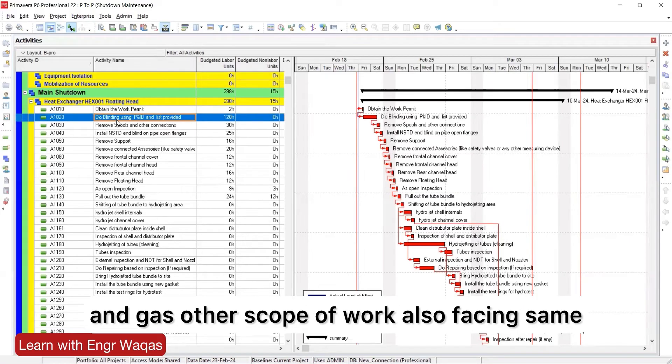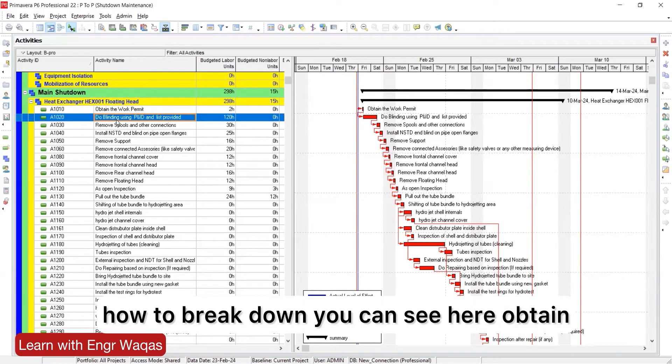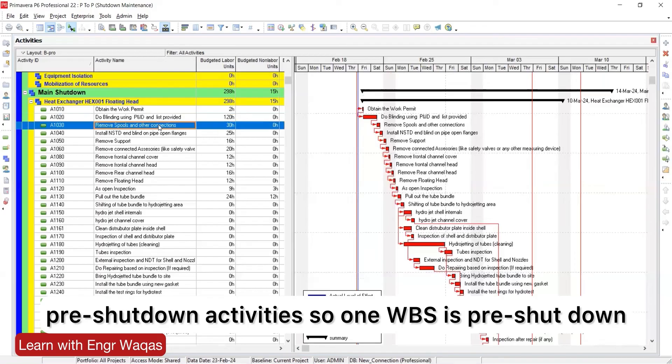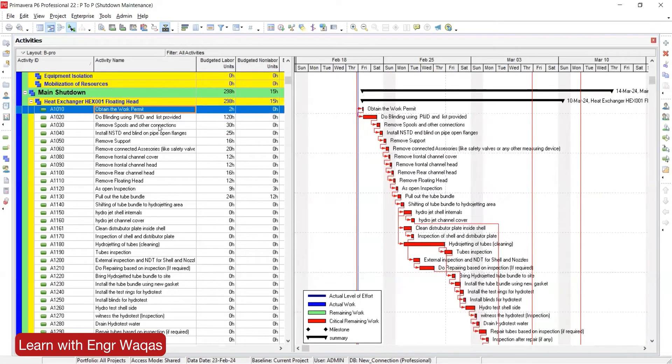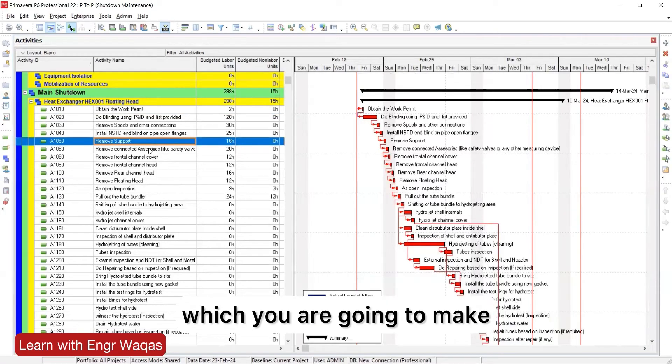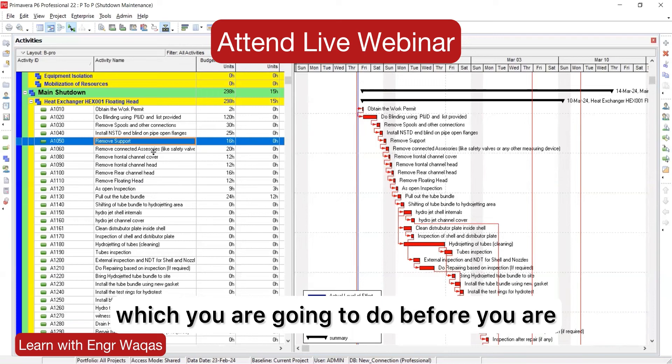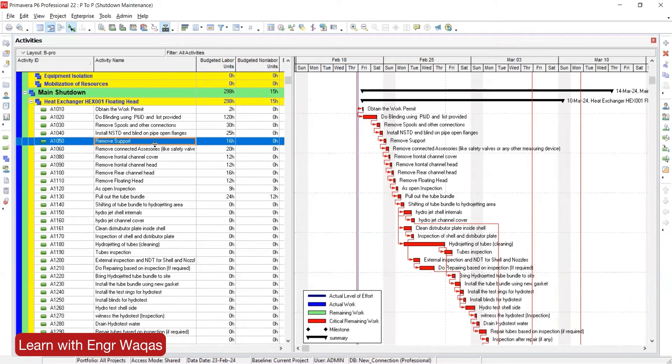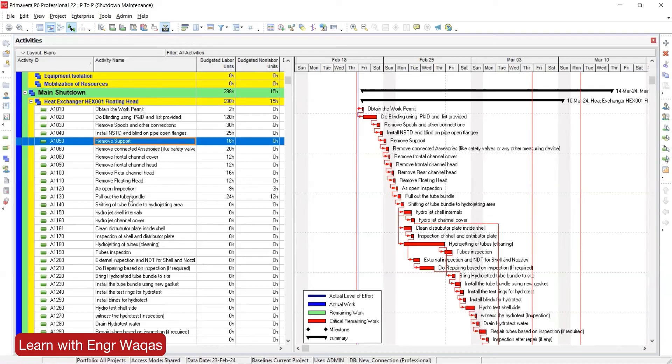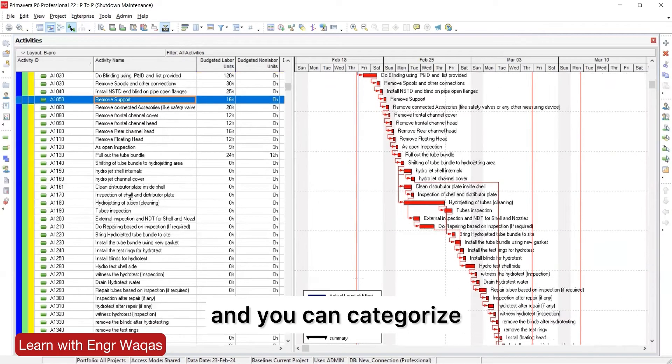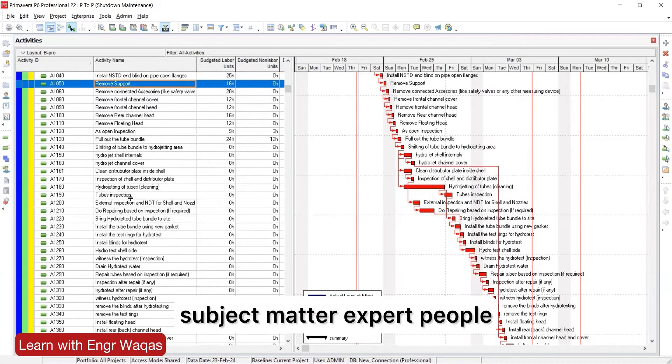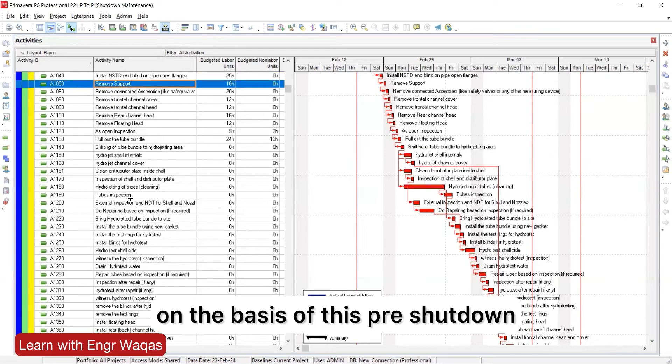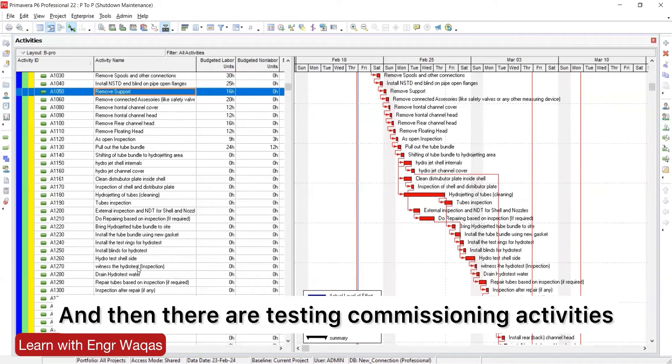How to break down? You can see here: obtain the work permit, do blinding. These are the pre-shutdown activities, so one WBS is pre-shutdown. Then you can see remove support, these are the things you are going to do before you conduct your shutdown. And then you can see the smart solution. This is one way you can go into the scope and sit with your team, sit with your subject matter expert people. These 50 activities can be broken down on the basis of pre-shutdown, shutdown, post-shutdown, and then there are testing and commissioning activities.